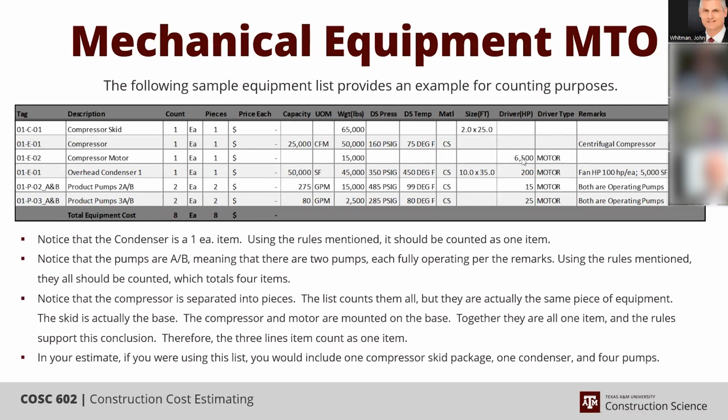Yes. Normally, as estimators, we approach this by going to our procurement department and asking, how much are these pumps? They go out and get a quote for them, and then we input whatever they come back with. If it's a very early effort and we're dealing with a lot of unknowns, then we might be able to factor things and go back to the point system.